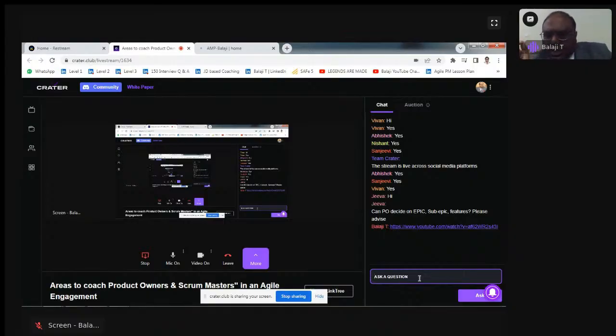Yes, Jiva is asking a question. Can product owner decide on epic, sub-epic features? Please advise. Yes, but we need to understand one thing. Product owner is not actually deciding on epic, sub-epic feature. Product owner is deciding on the product roadmap priorities, and your epic or sub-epic happens to be the building block of it, right? Because your product roadmap is going to contain initiatives which can be practically translated into consumable epics or sub-epics or features, because a sub-epic is a term used in Rally, and when you decompose a sub-epic, it is going to become a feature.